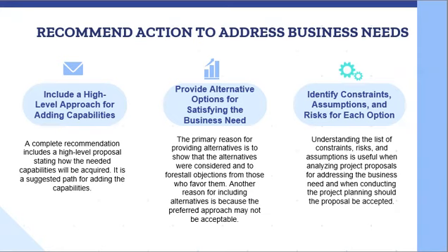So constraints are any limitations on a team's option to execute a program or project and may be business or technical related. For example, if a time constraint to deliver a solution is imposed on a potential project, a custom-built solution may not be a viable option and would need to be removed, or at best, not be listed as a preferred option.